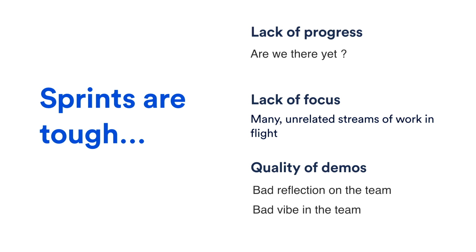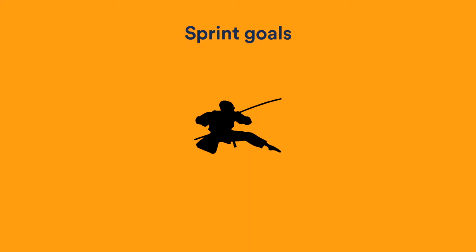And they're going to think about the demo, think about what they're going to demo in 2 weeks' time, and use that to drive their sprint goals. So that way they were almost guaranteed a really good demo if they hit their sprint goal.